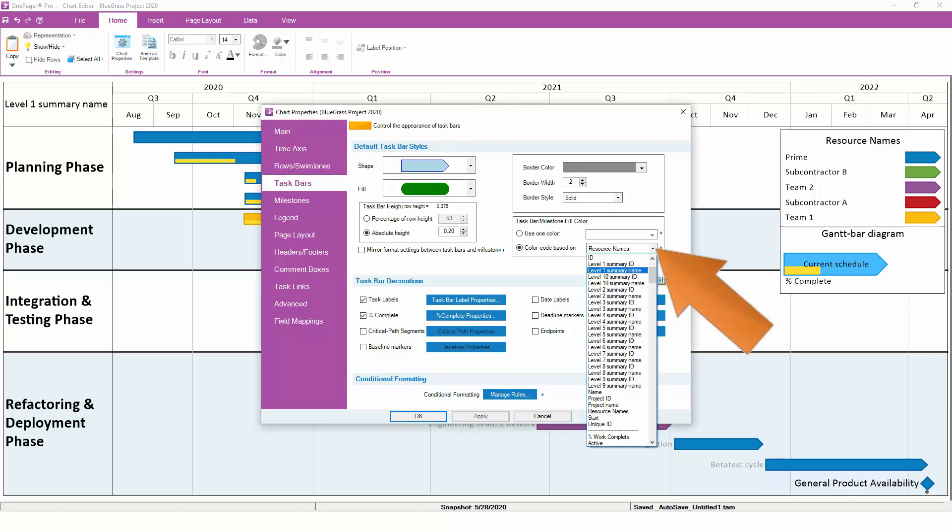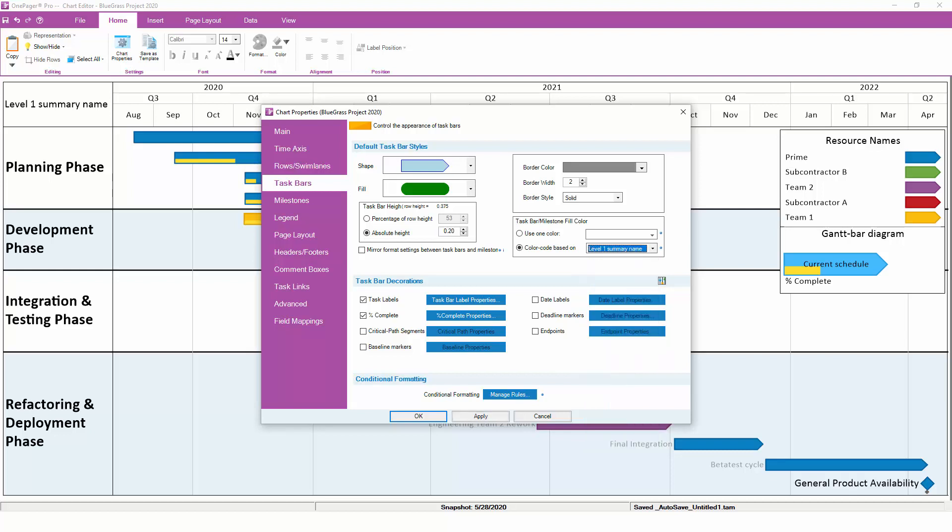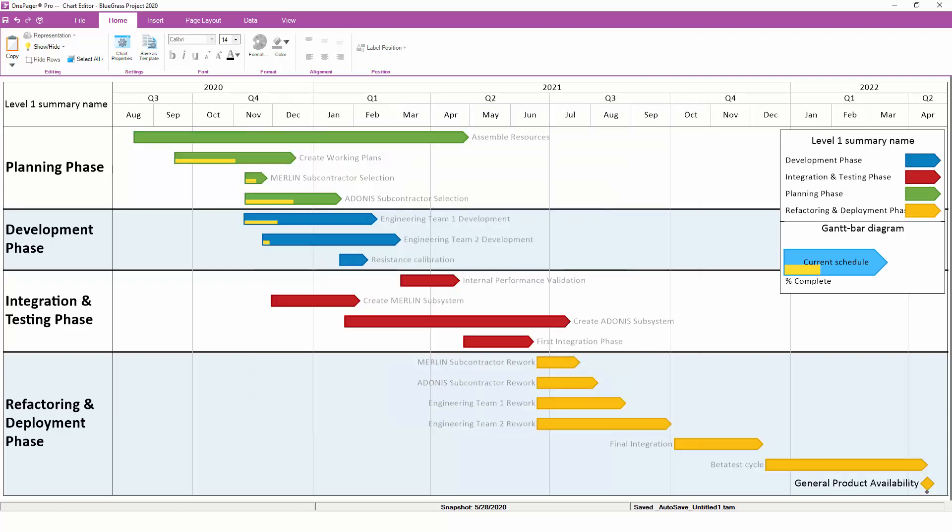You can change this round-robin color to any other field from your project plan. In this case, let's switch from Resources to the Level 1 Summary Name, or Parent Task. Once you click OK, you'll see that OnePager reformats the bars in the chart so that each family of tasks gets its own color.